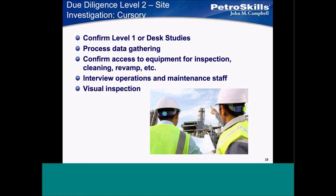The best source of any kind of information — and I think everybody would agree — is existing operations and maintenance staff. They live there. So you really need to spend a lot of time with them, with all your questions, with all the data you gathered, regarding the potential condition of the facility where you're going to be working. Do any visual inspection — can you get access to it? You're trying to avoid surprises.